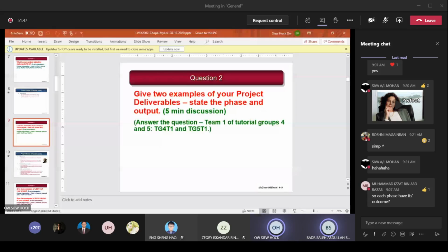Yeah, that's right. So in your data analysis phase, what are the deliverables? It will be the outcome of the analysis in tabular and graphical formats, right? So you see, you go very specific. These are your deliverables, and then the inferences, the conclusions that you made based on these statistics and also the graphs. Okay, understand? Yeah. So very specific. You understand how to state the phase and then what are the deliverables? It can be more than one. Can you understand very clearly how to state this? This is for data collection and data analysis, these two phases. Of course you got the earlier ones, the design of the survey form, and so on. You understand? Yeah. Okay, so that's good.